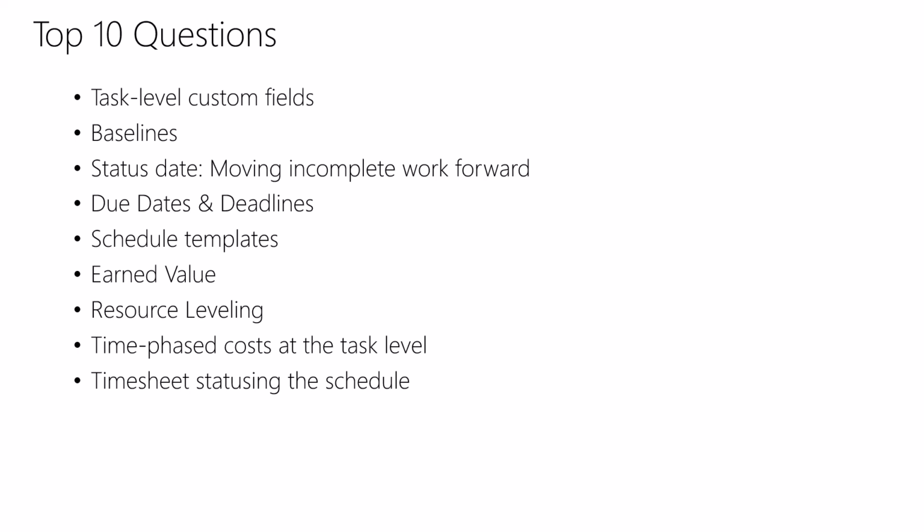Okay, final question. If I use generic resources for planning purposes, what do I choose? We actually recommend that you do a top-down resource planning outside of the schedule, and that can be done with both options through Sensei IQ's resource management module. But if it has to be on the detailed tasks in the project schedule, then Project Server is your only option.